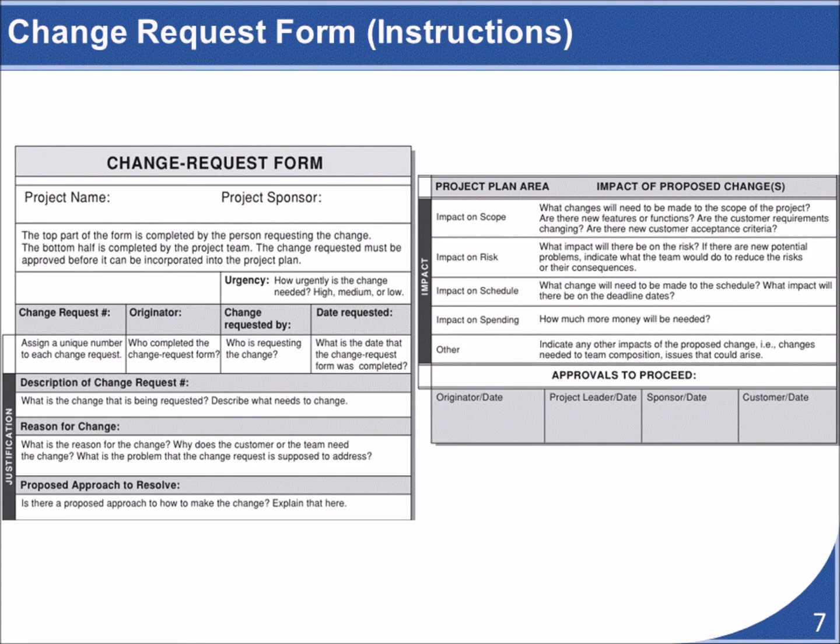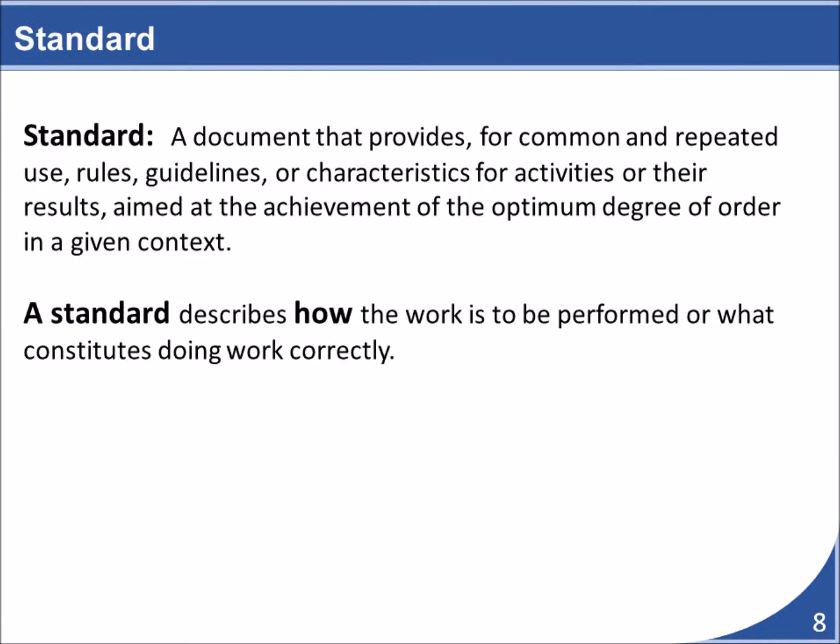In this form, we can see part of the actual project change management procedure. This form contains the step-by-step actions that make up the procedure. Notice that each step in the procedure is supported with additional detailed instructions that guide the reader in determining what information is required at each step. Collectively, policies, processes, procedures, and instructions go together to describe industry best practices for how things should be done on a project. Collectively, processes, procedures, and instructions are sometimes referred to as project standards.